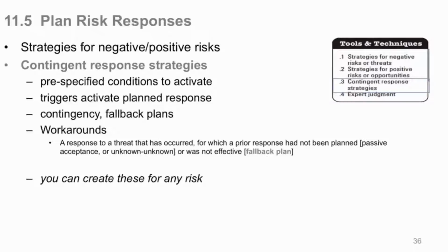There are 2 levels of this. Let's say a risk happens: there may be a union strike, and now you don't get your supplies. The first thing you do is your contingent response plan, which you would have in place, and the trigger would be, geez, I just heard on the radio this morning the plant went on strike. Now our production of our goods is stopped. Well, we have a contingency plan, and that is to move this to another supplier, take what we got or just rebuild it somewhere else. That would be a contingency plan.